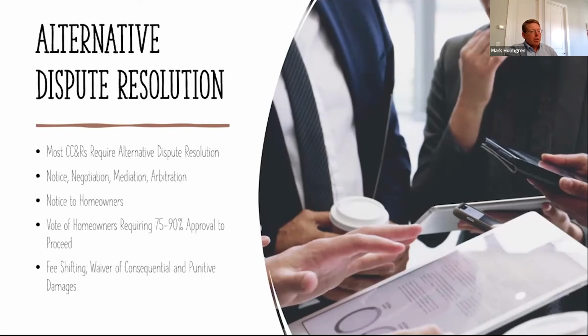Maybe it's a rental unit and you're going to lose rent because your tenant moved out because of this bad roof leak. All of these things are consequential damages. And they're something that is foreseeable to the developer. If they build leaky roofs, these things could all happen. That's foreseeable. And therefore, normally under Arizona law, you would be entitled to these types of damages.